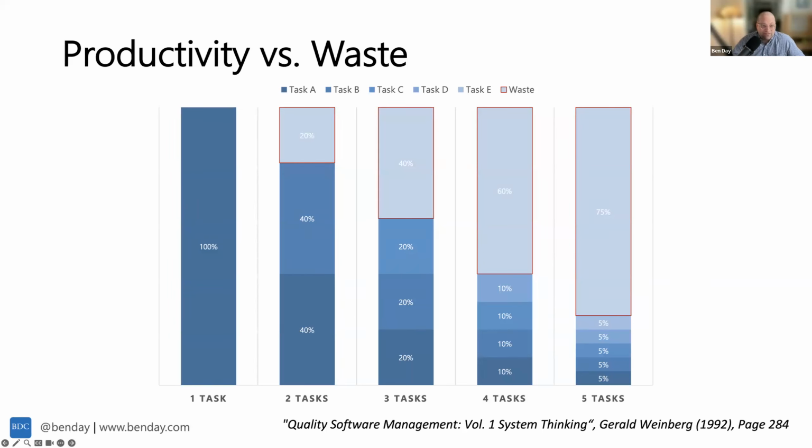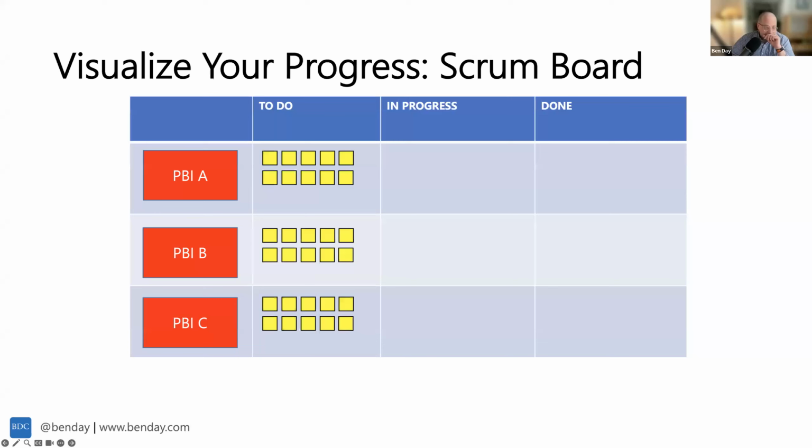Yeah, terrifying. So what we really want to do is get our teams working on fewer things at a time. Like, let's say right now that your team is working on 5 simultaneous tasks. That implies 75% waste. If you could get them down to 3 simultaneous tasks instead of 5, they're just working on 2 fewer things at one time. That implies that you will get a 35% performance boost out of your team just by crafting a different path through what you're working on.